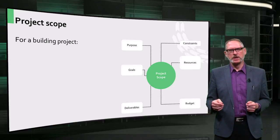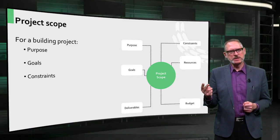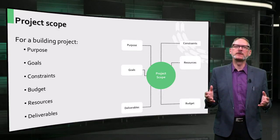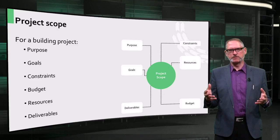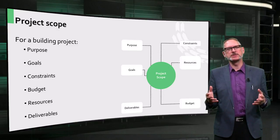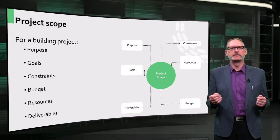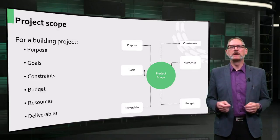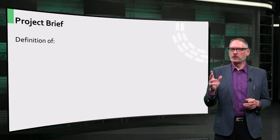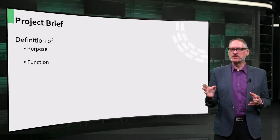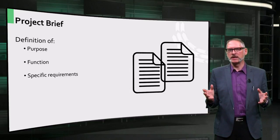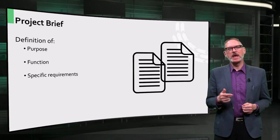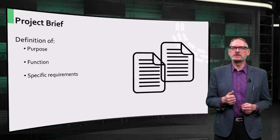Before anyone can go to work on a building, the purpose, the goals, constraints, budget, resources, and deliverables with which the building project can be realized must be outlined in a project scope. This scope document becomes the principal tool for ensuring that everyone in the project shares a common understanding of what is to be done. It also helps ensure that one does not get led astray or expand the project beyond its original purpose, a phenomenon called scope creep. As part of the scope, the purpose, the function, and the specific requirements of the building must be clearly outlined and detailed in a brief or a program of requirements. This sets out exactly what criteria the design and eventually the building itself must fulfill if the project is to be considered a success.